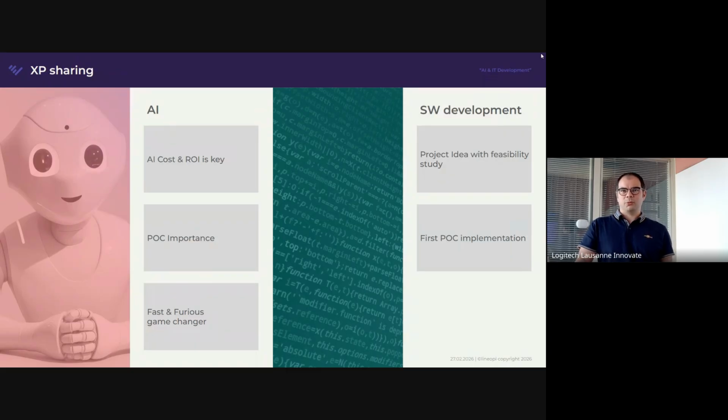And once we had this proof of concept, the next step was actually to run a lot of testing and correction. So let's say, from the 2 months the intern was in our company, he was spending half of the time only on the correction and testing phase, because the proof of concept was quite quick. So we had some working version of the tool after like 3 weeks, and then the rest of the time we spent a lot of time to test and to refine the tool.